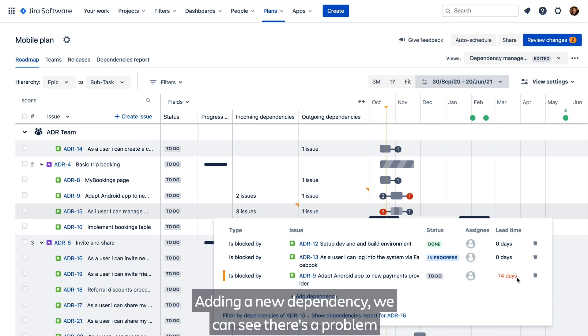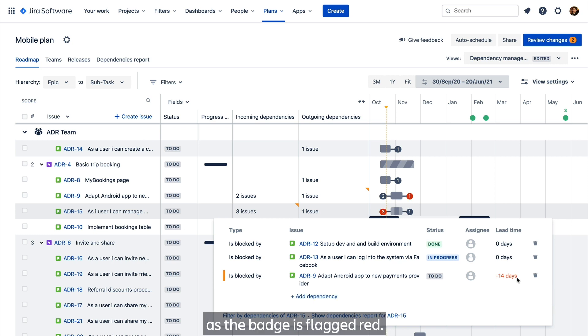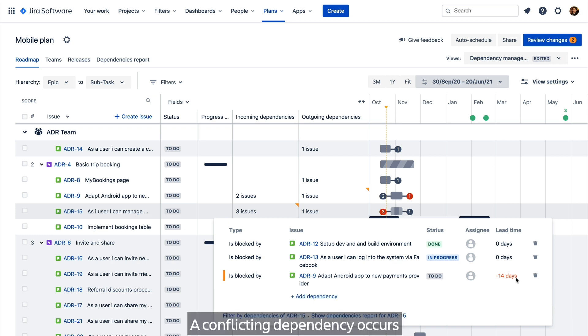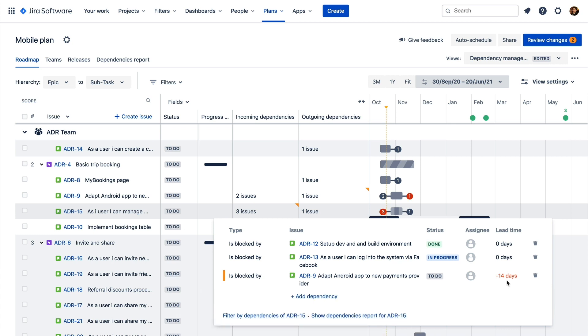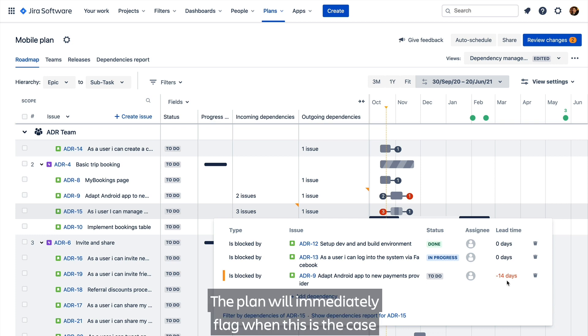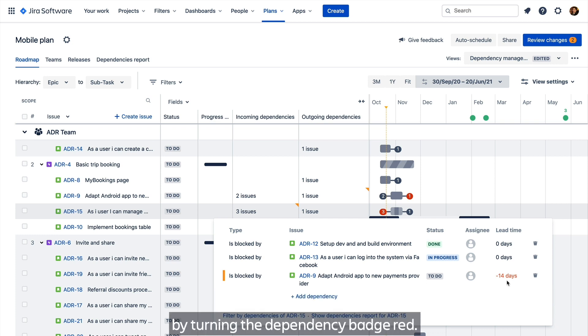Adding a new dependency, we can see there's a problem as the badge is flagged red. A conflicting dependency occurs when the end date of a blocking issue overlaps with the start date of the issue it blocks. The plan will immediately flag when this is the case by turning the dependency badge red.